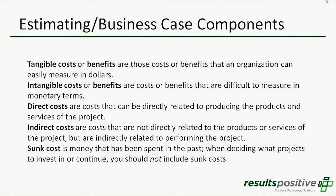The other thing to remember when you get into benefits management, and we'll be doing a webinar on this towards the end of the year, is the owner of the benefits is not the project manager. The owner of the benefits is not the project team. The owner of the benefits is the sponsor and the sponsoring organization. The project manager and the project team help them get there, but ultimately, the PM is going to go away at some point and probably move on to another project. The project team is going to disband, and they're going to go on to other work as well. So it's your sponsoring organization that's ultimately accountable for those benefits.